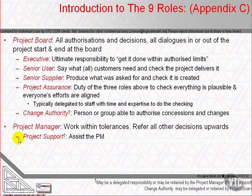If not delegated to a separate person or function, project support is provided by the project manager. The support role includes maintaining project files, document control and configuration management, collecting performance data, updating plans and making forecasts, administering project board meetings, quality reviews and quality records, as well as providing expertise in planning and control tools or risk analysis tools and techniques.